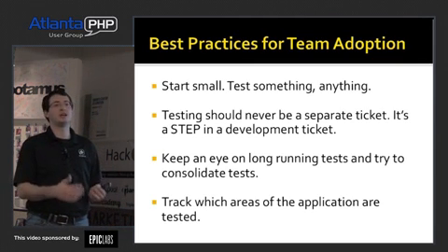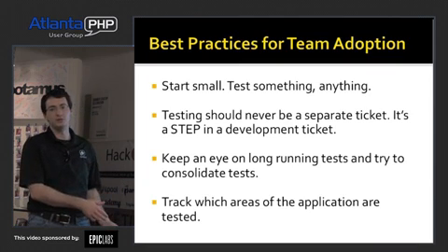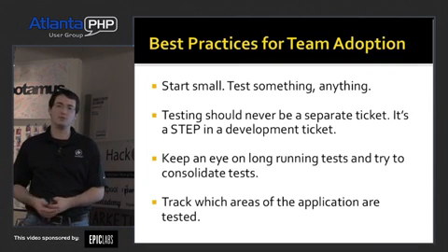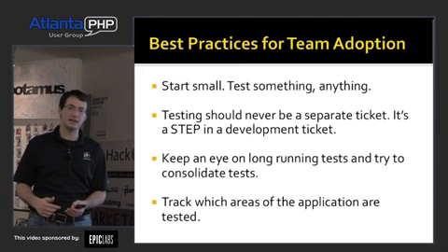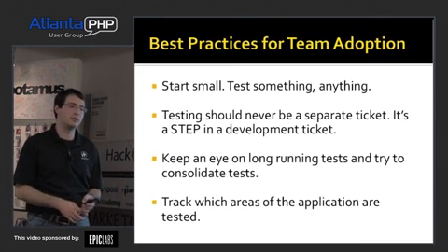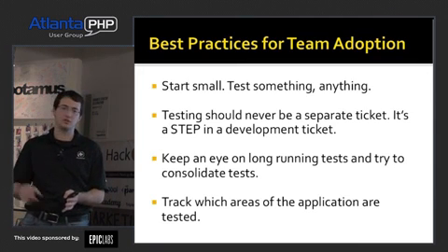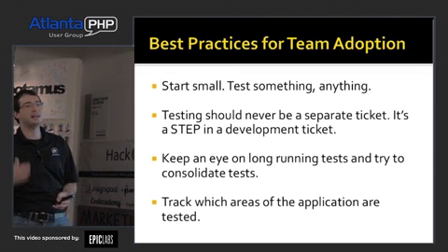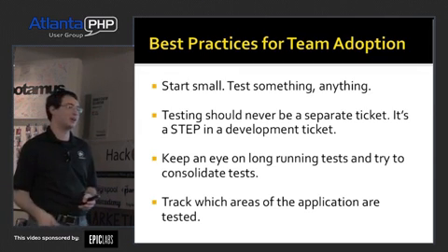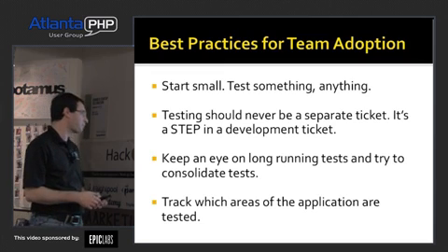But again, don't send a ticket for code review until you've written a test for it, because that's the very first thing that's going to happen in code review: a developer who's looking at that. And by the way, all of our code at PatientCo goes through code review, even if it's just a quick glance. It's going to get right back to you. So again, make testing a step in a ticket, not a separate ticket. That will get you a lot of wins.